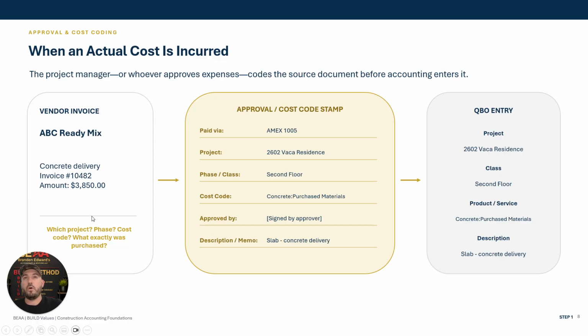And then what we do is the project manager that is responsible for that project, for the approvals, or whoever it is, normally has this sent in a quick email, forwarded from your phone, very fast. Have the guy send it to you via WhatsApp, a receipt that they are out in the field that you approved. Grab that, forward it to the AP email, and just include this cost code real quick. I have this copied and pasted in my notes for whenever I'm approving for any projects that I'm working on.